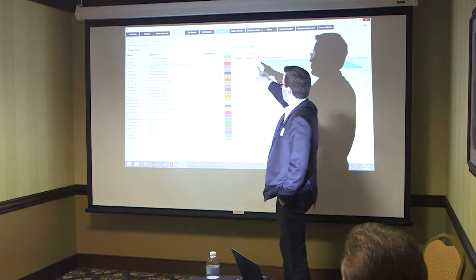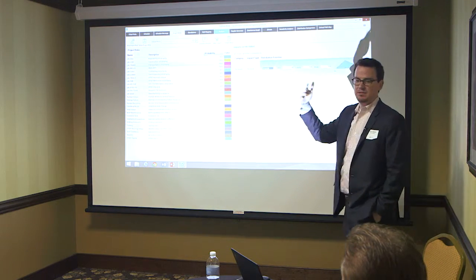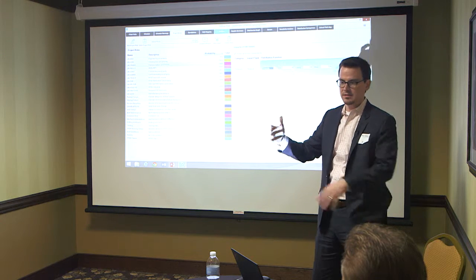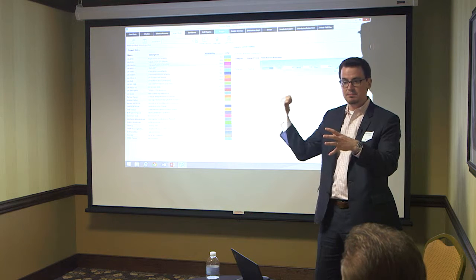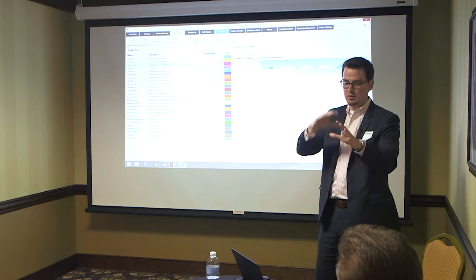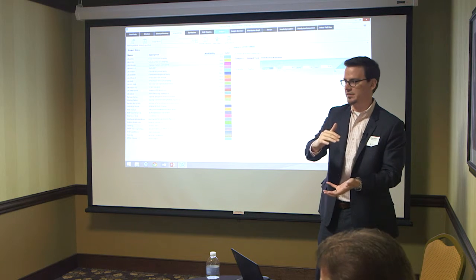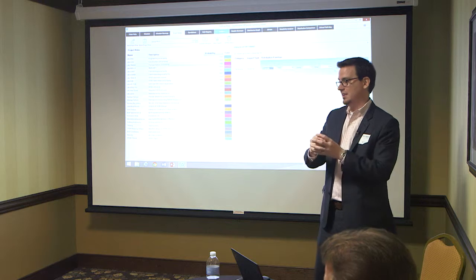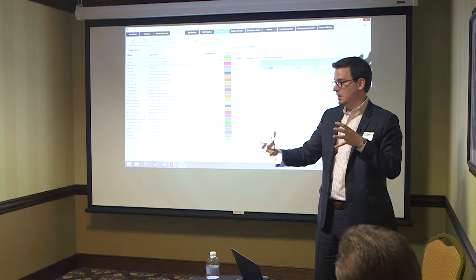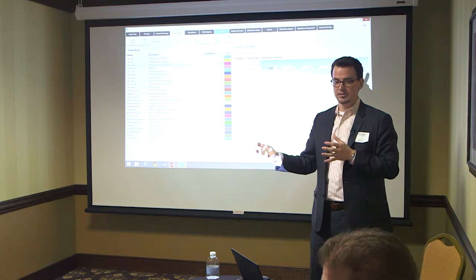I can break up the way we model that by saying impact the activities independently. What that means is I take one risk, I model it against 5 activities. If I say impact independently, it'll impact sets of those activities differently. It won't impact all 5 of them at the same time. It'll impact 1 here, 2 here. It'll mix it up, right? So it actually breaks the correlation there to, you know, again, give you the way to model that more realistically.